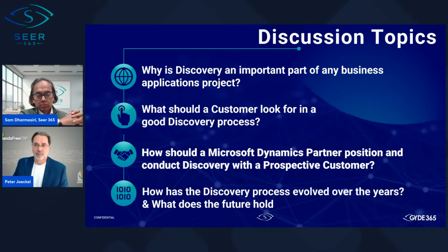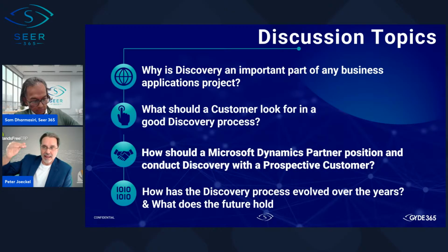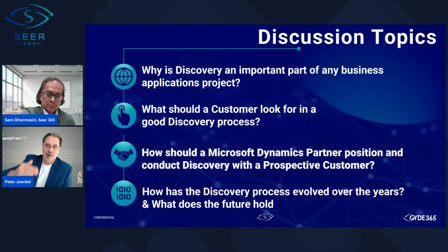Second thing I do is say, okay, we've got them all answered. Now here's what we're going to do. We're going to flip them into business process view. And now all of those questions, requirements are going to be jumbled. Instead of being in a functional area, they're going to follow a business process the way a modern cloud-based ERP thinks of following steps to complete a business process. Now go back with some folks in those business areas and take a look at those questions that you answered in the context of a business process flow.